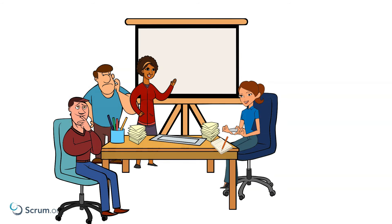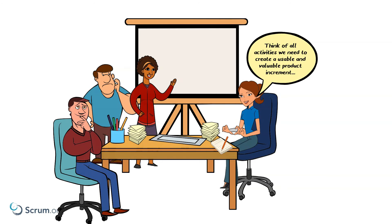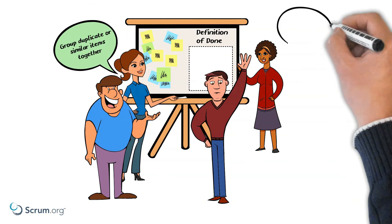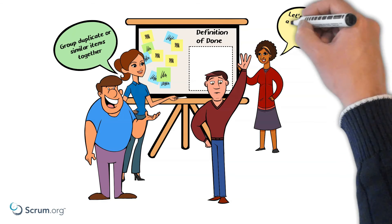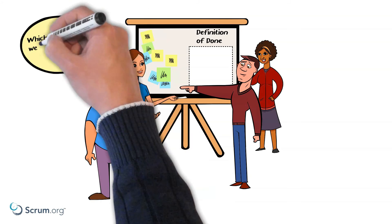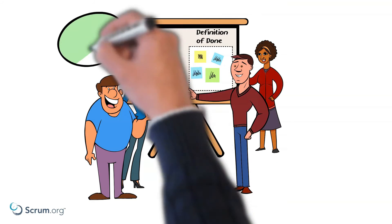Now that everyone knows the difference between acceptance criteria and the definition of done, Robin asks everyone in the team to individually think and write down on a sticky note all the things they can think of that are needed to create a usable, valuable product increment, and add it to the board. Once done, the team groups any duplicates or similar items. Robin allows time for team members to ask questions and discuss items that need further clarifying. It is then time to agree which items should be included in the definition of done, and they do a vote to ensure everyone agrees.